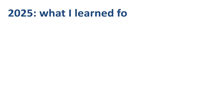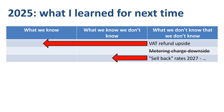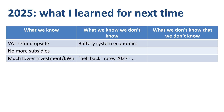The main benefit of doing a retrospective on a capital expenditure project is to summarize the lessons learned before embarking on your next project. The VAT refund is now something I know. Additional metering charges no longer apply, as there are no more subsidies on solar panels and no related reporting requirements. The uncertainty around rates for selling back to the grid remains, but at least we know that we don't fully know the answer yet. If my current system stops operating and I consider a new one, I need to account for no more subsidies — but the investment per kWh has come down exponentially over the past decade and a half. A big factor to add to the 'what we know we don't know' category is the economics of installing a battery system along with a new set of solar panels. Time will tell if it will be worth it.